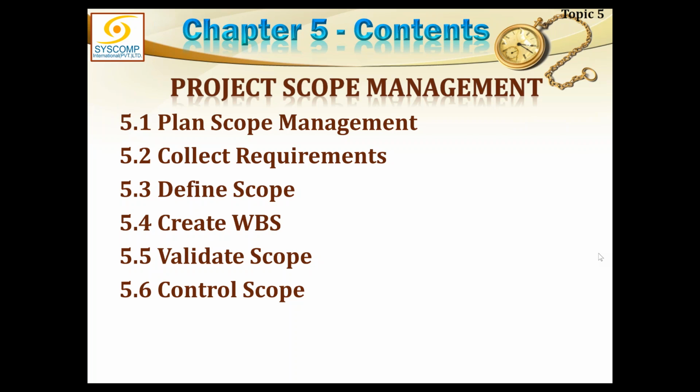Similarly, the last process of time planning will result in the formation of a schedule baseline. The last process of cost planning will result in the formation of a cost baseline. These are the three major baselines which we are interested in, and they are responsible to get the job done in execution. So we are not entering into execution as such, but we are baselining. Baselining means that we are getting them approved by the boss.